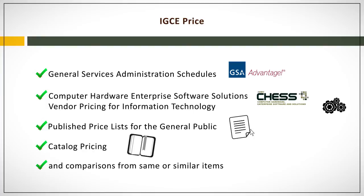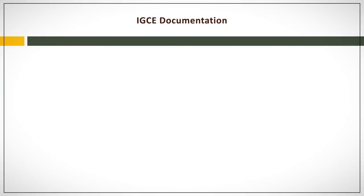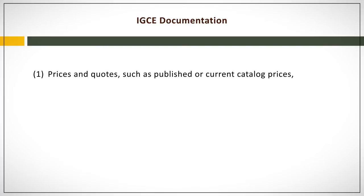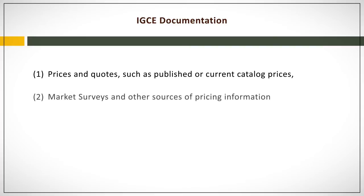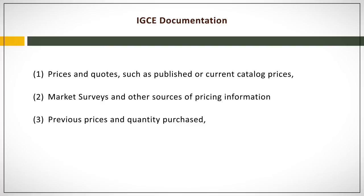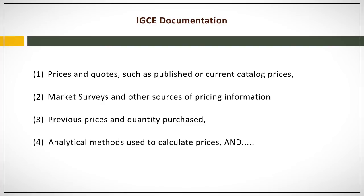For price information, the IGCE documentation may include prices and quotes such as published or current catalog prices, market surveys and other sources of pricing information, previous prices and quantity purchased, cost analytical methods used to calculate prices, and quantity of items to purchase.